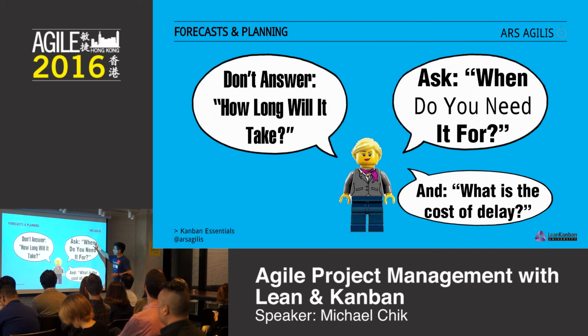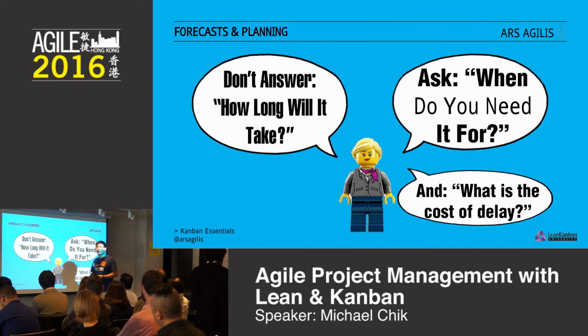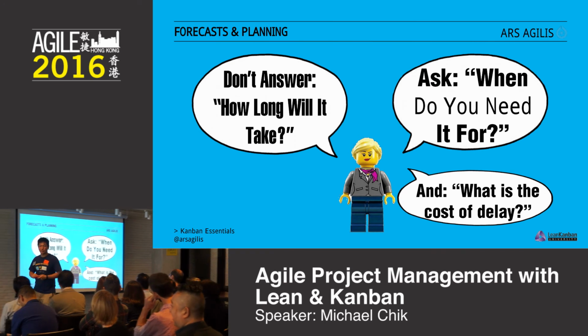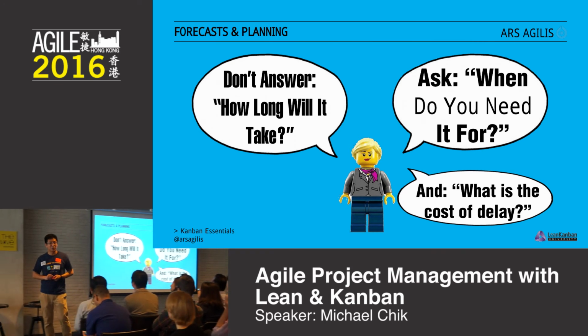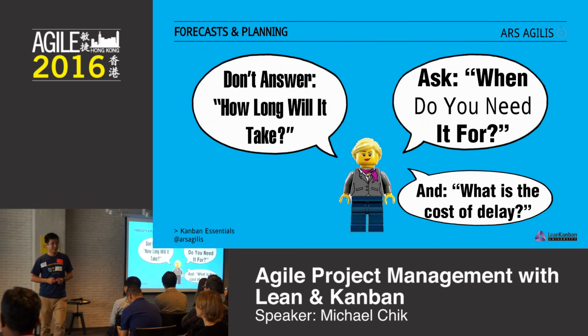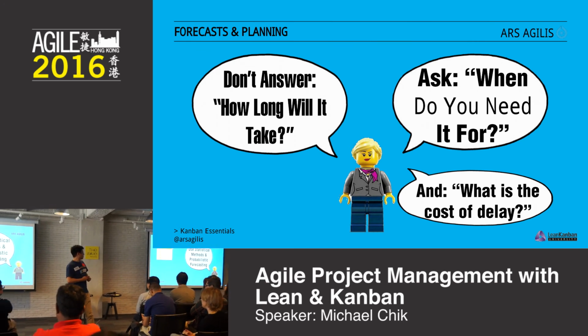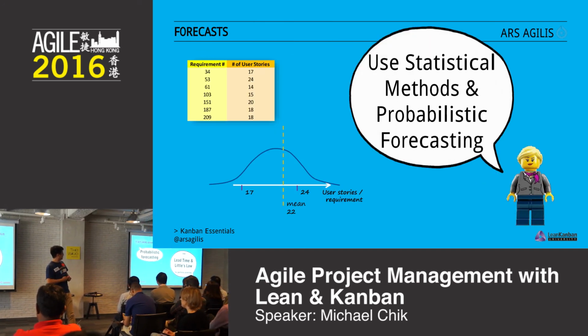Okay, another way, oftentimes we get asked how long does something take? Turn this around and ask people, when do you need it, and what is the cost of delay? So if we don't do it by then, what's the cost? Most of the time the answer is nothing. There is no cost. In that case, it's not urgent, and you can delay it. We'll talk about this.